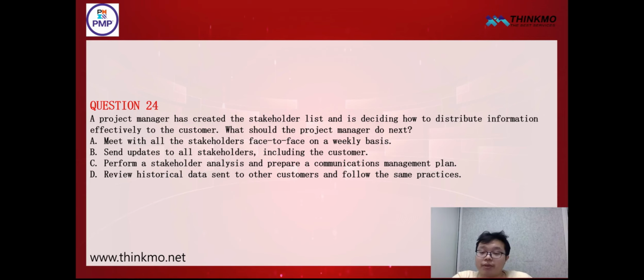This is the proper approach, right? This allows the team to finish the tasks they are currently working on, so everything can proceed smoothly without any other disruptions. If you were to add it in immediately, right? The next time, when it comes time to add new features, temporarily adding new features like this could actually have a certain impact on the work of our team members, which really isn't ideal.